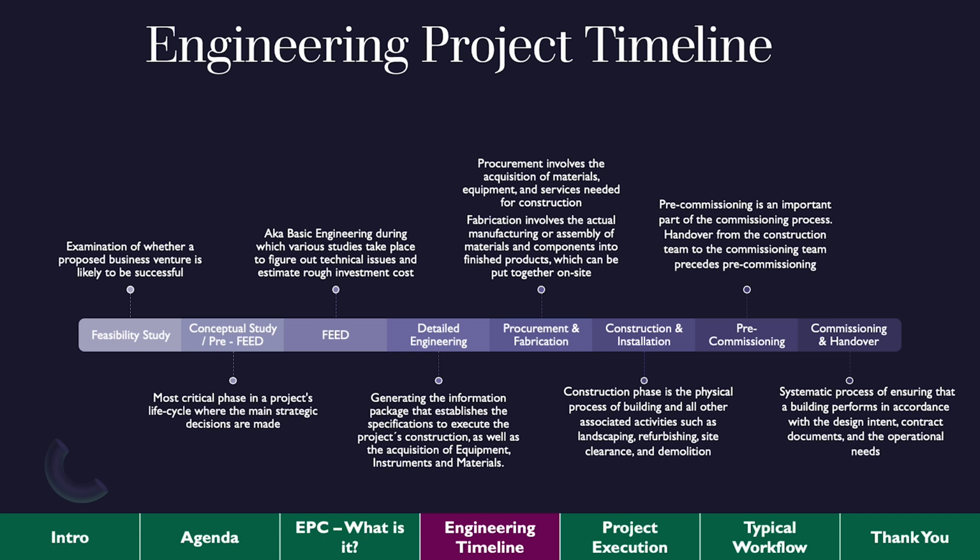What the engineering function entails is going to be dependent on what phase you start from. If you are starting from a phase where you're already 100% sure what you want to do, then it's going to be basic engineering, followed by detailed engineering, then the planning, and then construction engineering. Not the construction, just construction engineering itself.